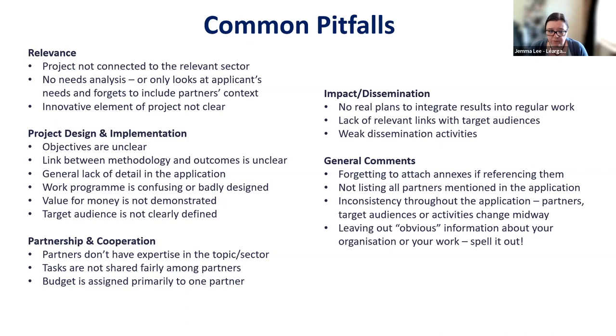In terms of the partnership, make sure that the partners are relevant, that between all of the partners you have all the expertise that you need and that you're connected to the sector and to the target groups that you're hoping to work with. There's also the cooperation side of it, so that the tasks and the budget are shared. They don't have to be exactly equal, one partner can be taking a lead on different areas, but there needs to be a fairness and it should be clear why different things are assigned to different partners.